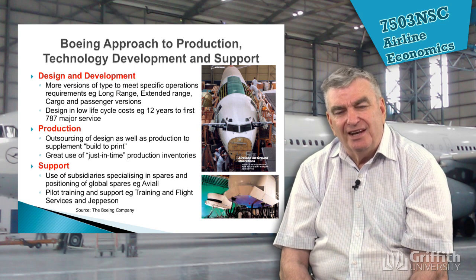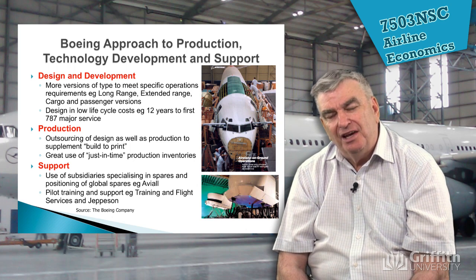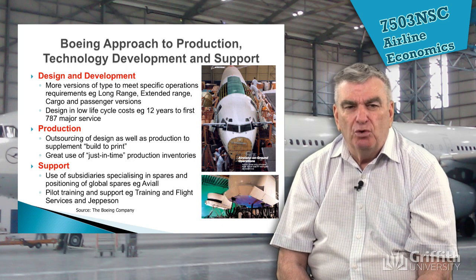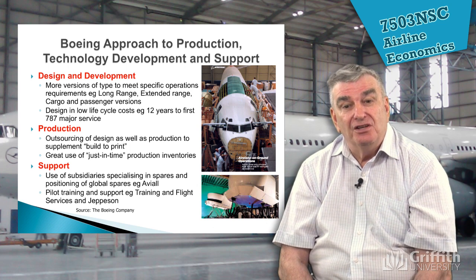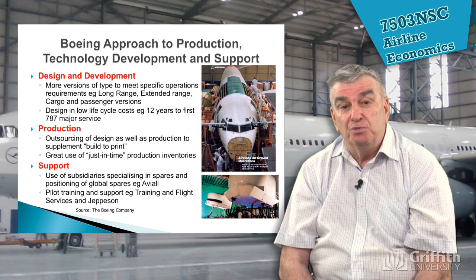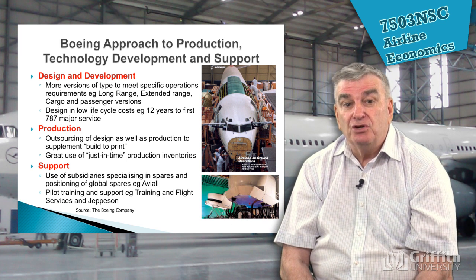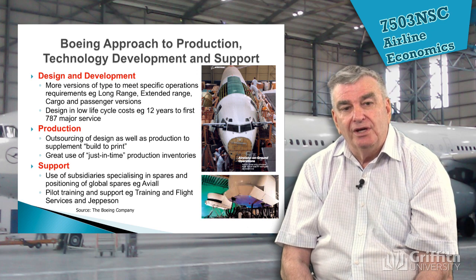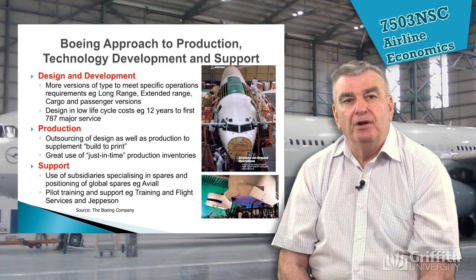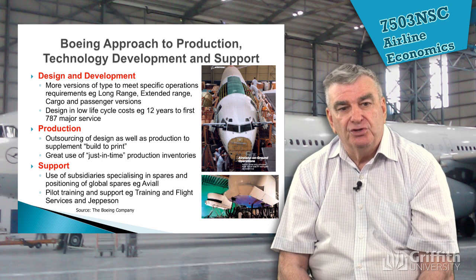And what we know is that aircraft now are a huge investment. Airlines have to really think carefully about, do we want to produce this type of aircraft? For example, the Airbus 340 has had a very, very short life because people said it's got 4 engines and we can do the same with 2 engines, much greater economy. So it's important for people to look at the long lead times and say, is the aircraft we're looking at today going to be popular with a customer in 12 years' time when it first comes out?